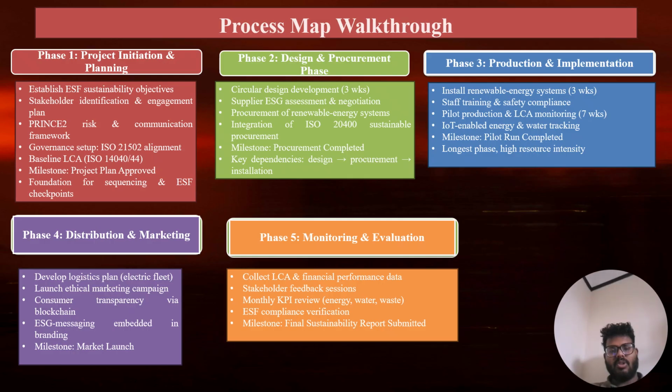The final phase is monitoring and evaluation, to ensure long-term sustainability performance. LCA and financial data are collected over 6 weeks to measure progress against targets. Stakeholder feedback sessions define future cycles, and KPIs such as 45% energy reduction, 60% water recycling, and 70% waste diversion are validated. The project closes with the milestone final sustainability report submitted. We document lessons learned and ESG outcomes.